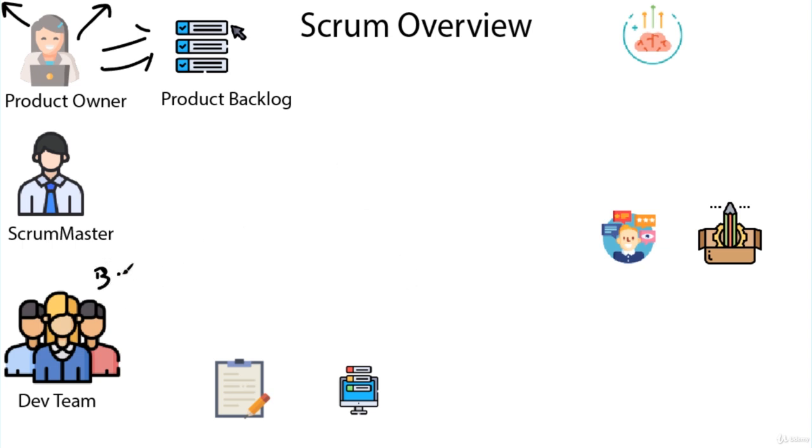The dev team is very important, and it's also very important to note that the dev team needs to be, for an effective Scrum, 3 to 9 people. Any less than 3, and you don't have that sort of serendipitous communication between each other, ideas aren't built upon, roadblocks halt the entire team. Imagine if you have a single developer, then what if a bug is breaking the app and it takes them 2 weeks to find that bug? Well, that's 2 weeks of no production.